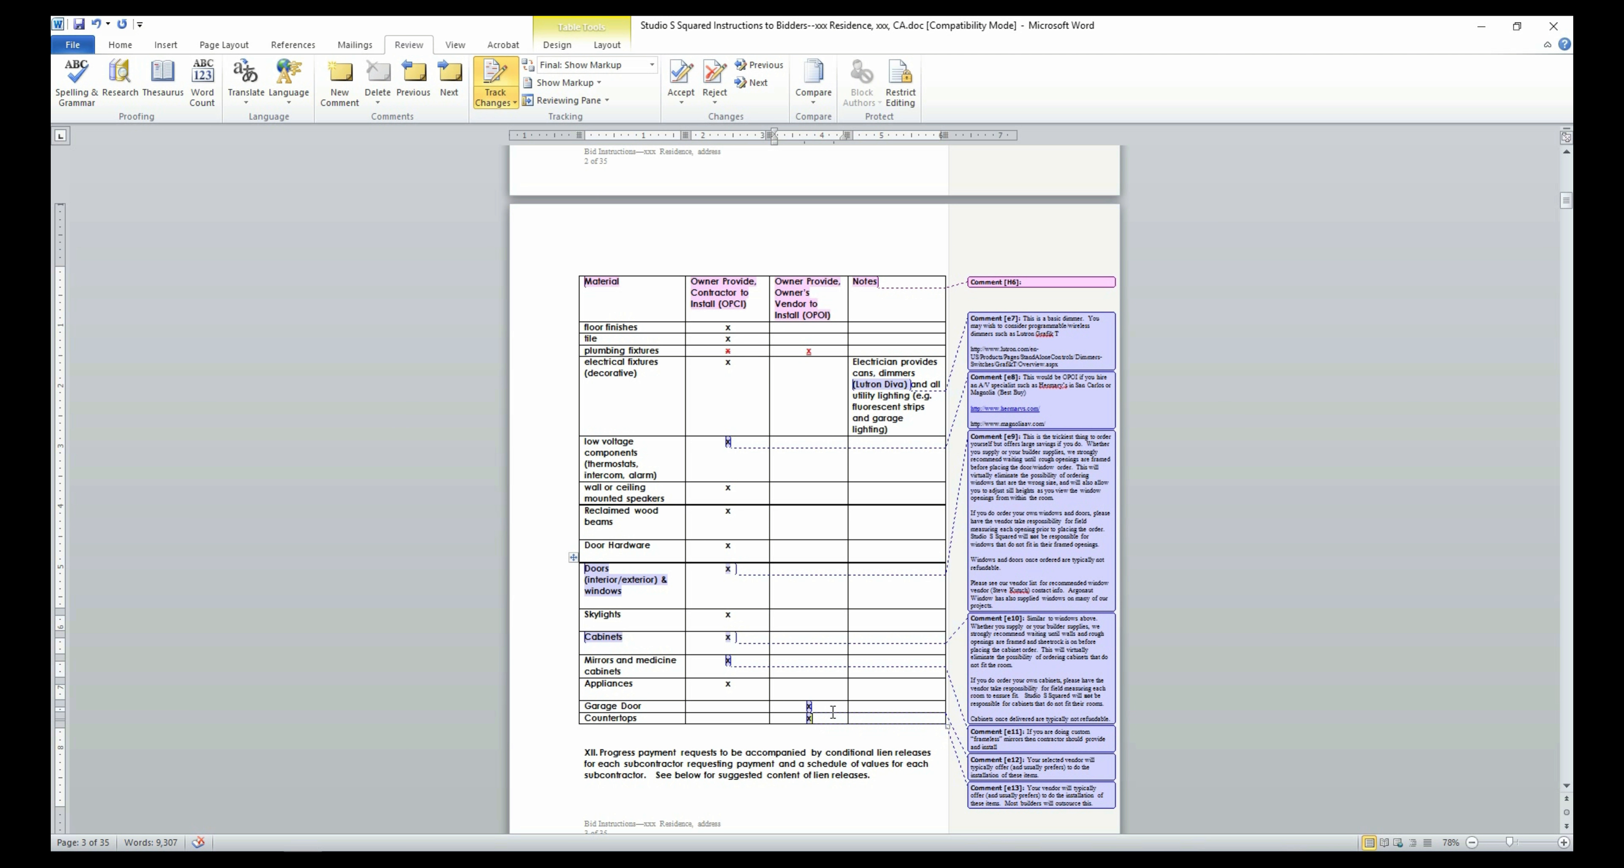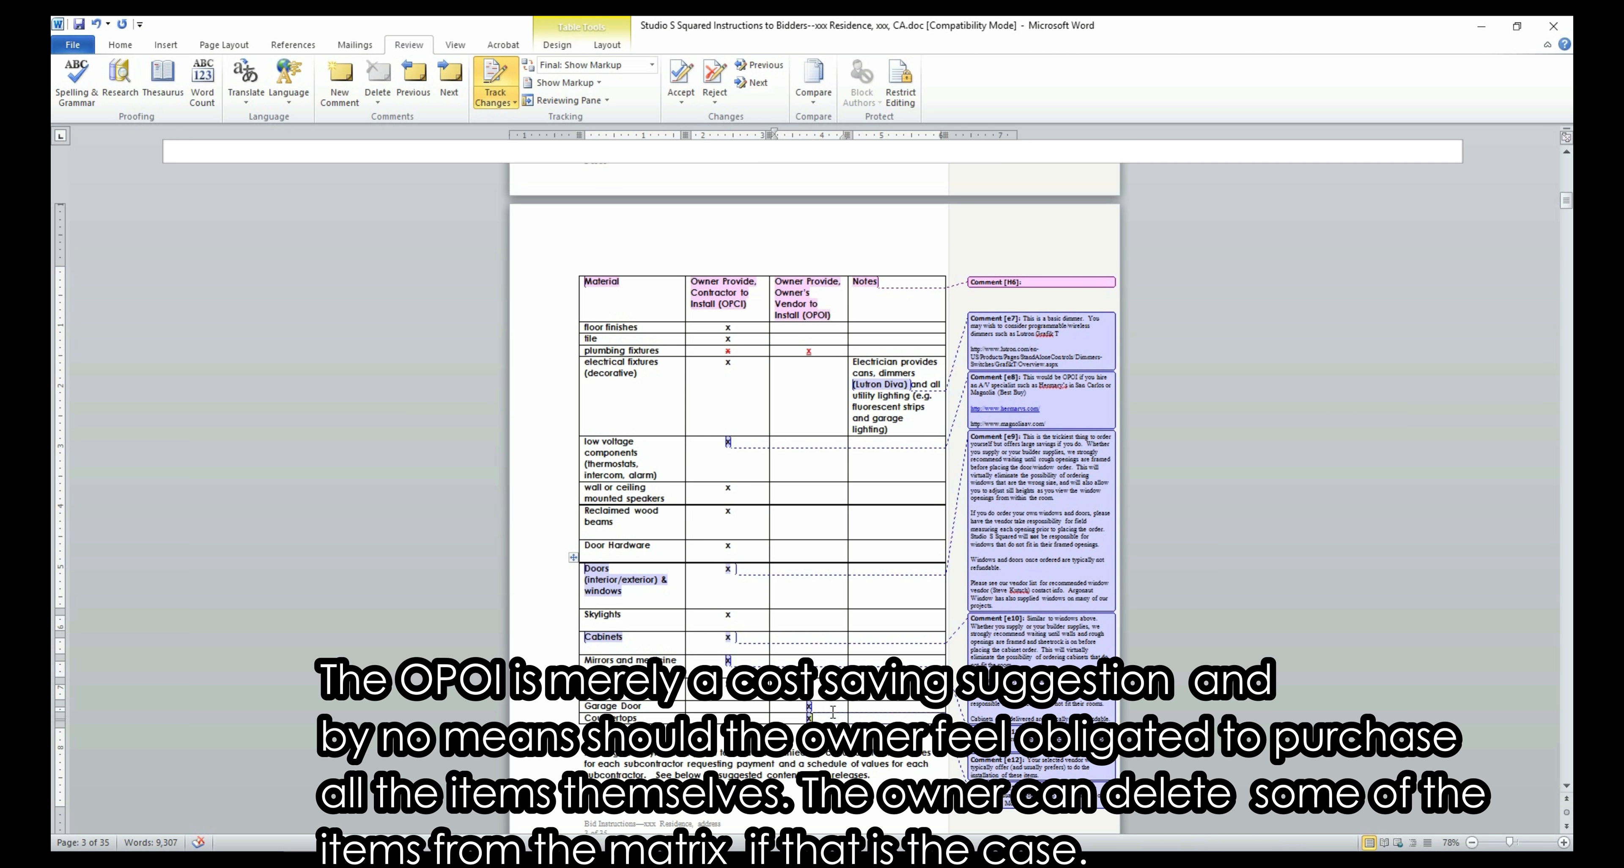However, in this option, the contractor will charge a markup for all the materials he or she purchases on your behalf. So this option will end up being more expensive for the owner, but may be the right choice for some homeowners that feel that they do not have the time, capability, or interest to purchase certain materials themselves.